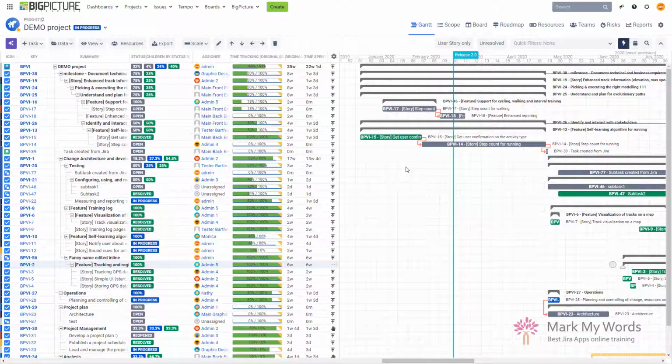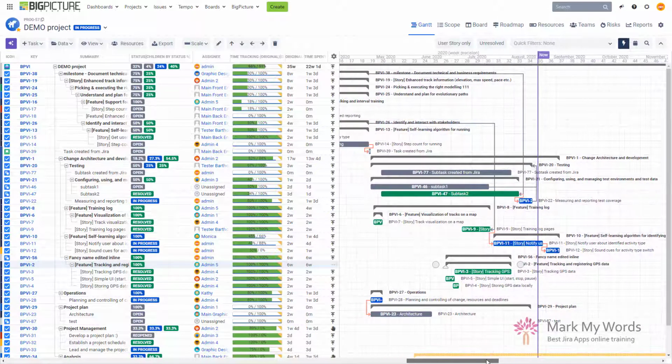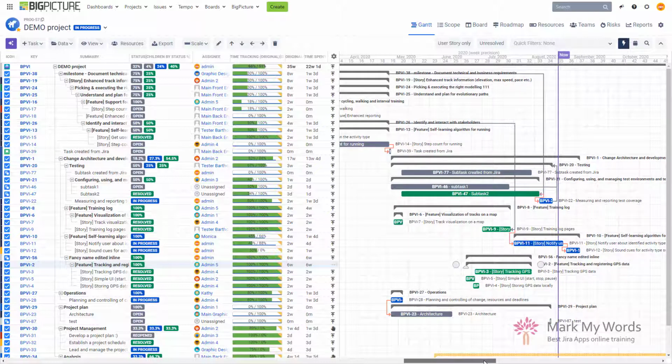This is where you see the placement of those tasks in time. Every task will have a beginning and an end, which is a start and an end date. They will be connected with links. So there are 4 basic links that you can use here. Of course, those links also create some logical dependencies between those tasks, and the tasks will behave in a certain way depending on how they are connected and how you move them around later on.